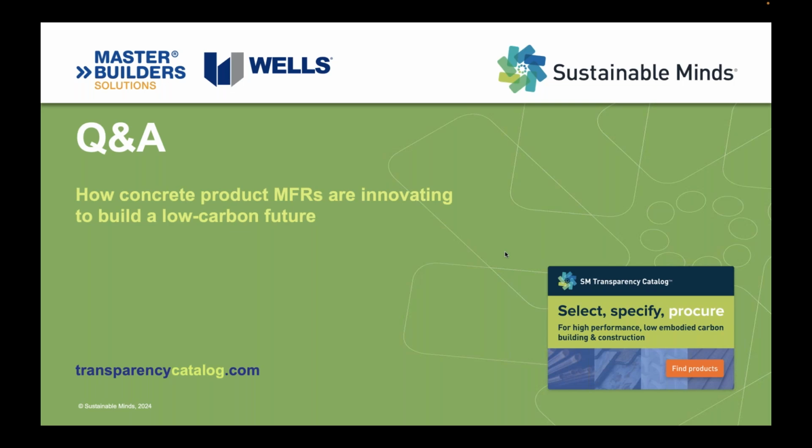Precast is a great way to do that. You can push the time consumption to the precast yard or the precast factory. Cast in place, we have to be a little more deliberate. We have to understand the entire process. What's the footprint look like? Are we in an urban location? We're getting ready to start in Sacramento, where I live, a new garage at the airport that's going to be operational in 42 to 44 weeks and park 6,000 cars.